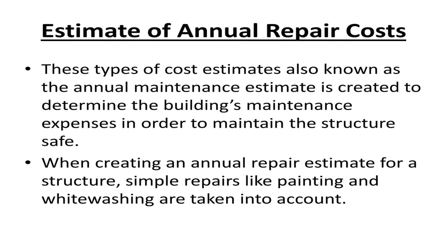Estimate of annual repair costs: These types of cost estimates, also known as the annual maintenance estimate, are created to determine the building's maintenance expenses in order to maintain the structure safe. When creating an annual repair estimate for a structure, simple repairs like painting and whitewashing are taken into account.